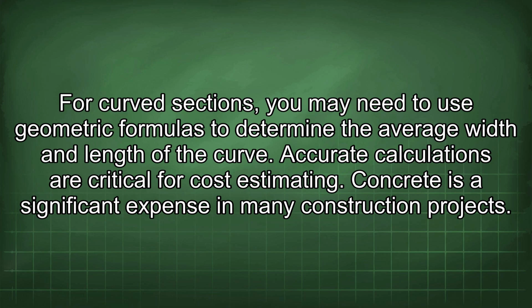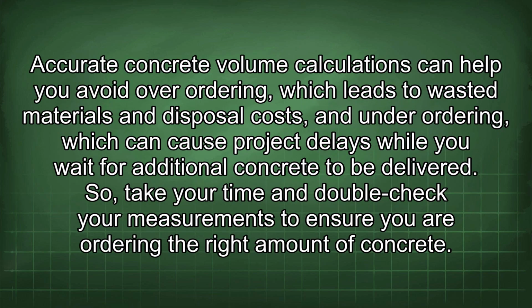Accurate calculations are critical for cost estimating. Concrete is a significant expense in many construction projects. Accurate concrete volume calculations can help you avoid over-ordering, which leads to wasted materials and disposal costs, and under-ordering, which can cause project delays while you wait for additional concrete to be delivered. So take your time and double-check your measurements to ensure you are ordering the right amount of concrete.